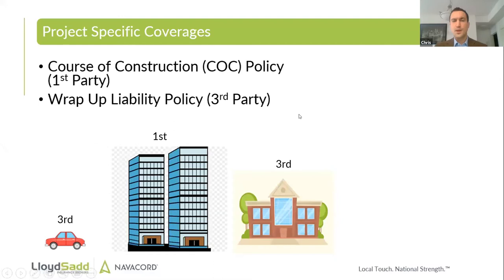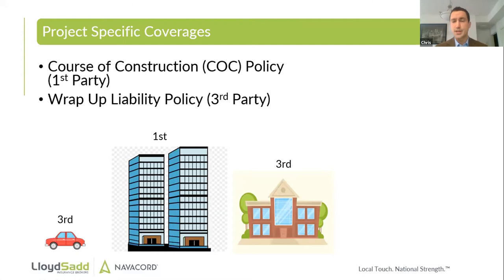We'll start out by talking about the course of construction and the wrap-up liability policy. We want to understand how these two policies function and what they are for. A course of construction policy is a first-party coverage — it covers the project that's being worked on, represented by the two big buildings in my graphics here. The wrap-up liability policy is the third-party coverage — it covers damage and bodily injury to neighboring buildings, vehicles, and people. A lot of times those two get confused, so I want to be very clear on what each covers.